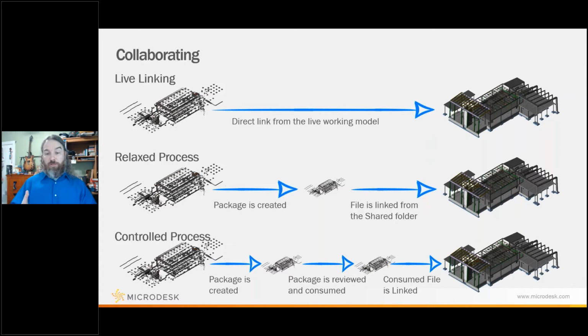So if I, as a project manager, want to control the files that my team gets, let's say we had a coordination meeting last week and they said they would make changes. Before this file is utilized by my team, I want to review it to make sure that the changes I expect are done, or that there's nothing in there that I feel is going to cause problems. Once I've reviewed it and approved it, perfect, that background goes in.